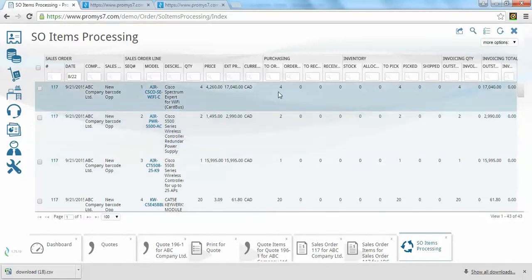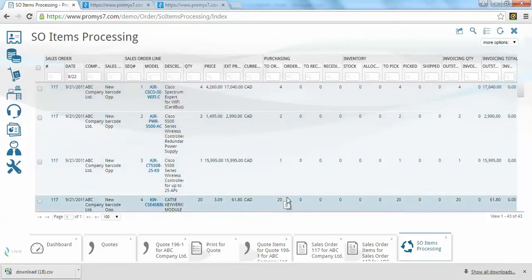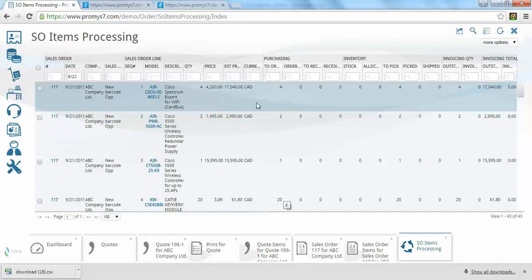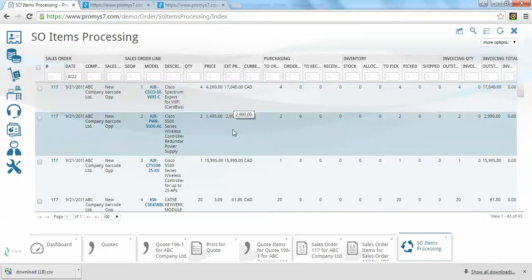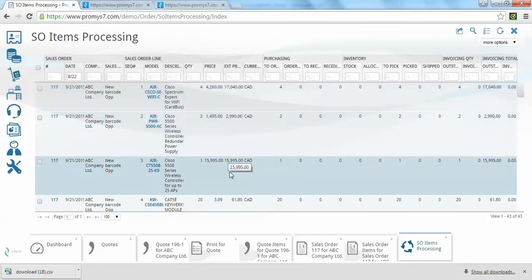So basically what I can see is, have these items been ordered? Yes, they've been ordered and placed on PO. Now I'm waiting to receive them. Now they've been received, and if we're staging them, now we've staged them and we've picked them, and now we ship them to the customer. So instead of having to constantly bug the order fulfillment team for status updates on the equipment delivery life cycle, whether these items are ordered from Tech Data and these items are ordered from Synnex and these items are ordered from Ingram, I can just go in as a project manager and actually see the real-time status myself.